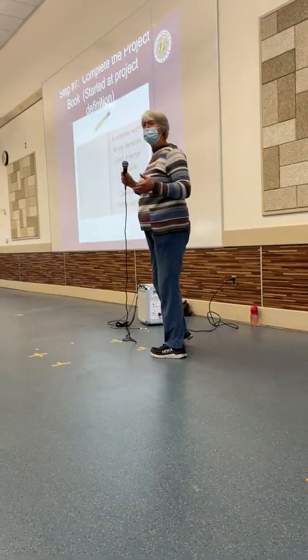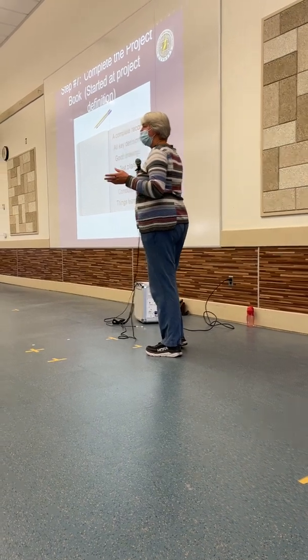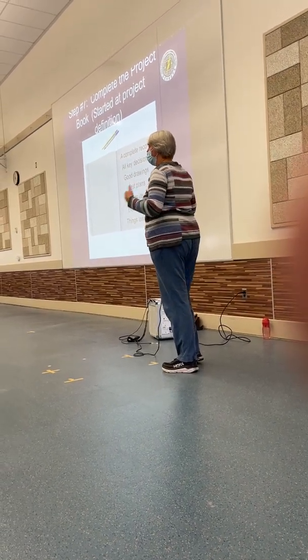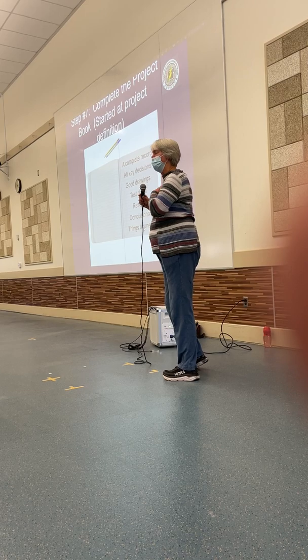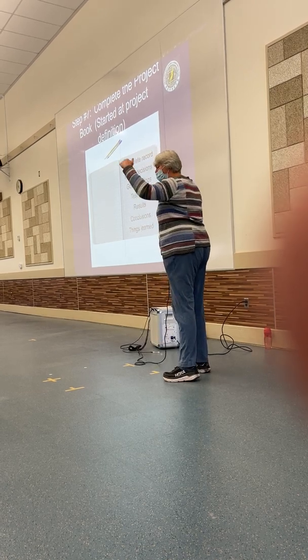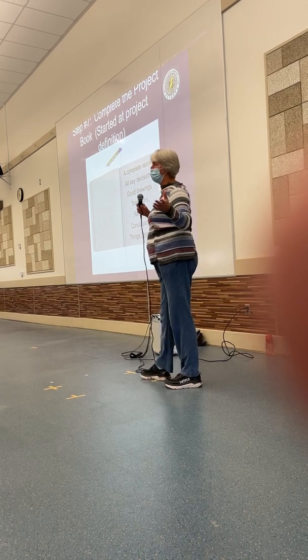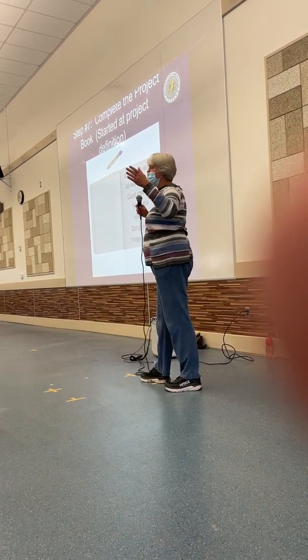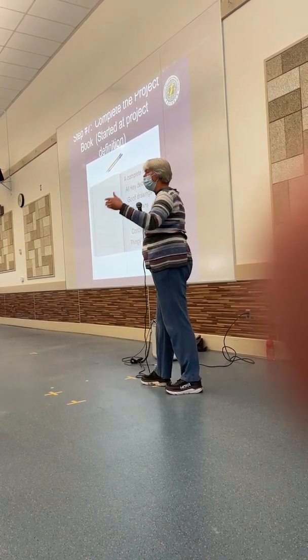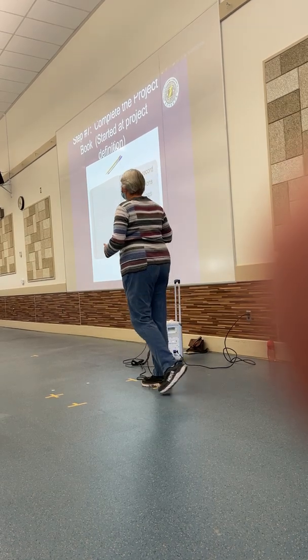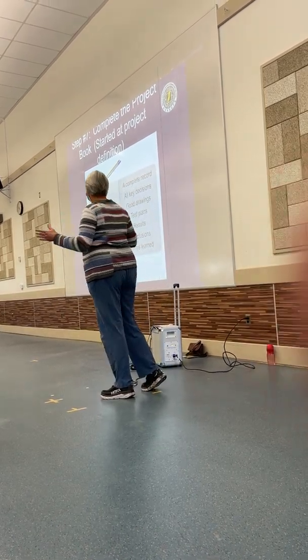And lessons learned. And like I said, this is actually an important step, because at NASA, we do lessons learned. I'm constantly going through the lessons learned databases for the Mars rovers to try to understand where they had failures and where we can improve ours. So it's really important to document these things.